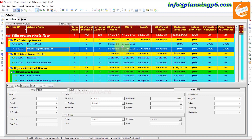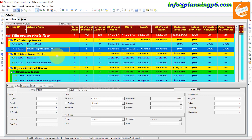Now we will add a revised schedule. You can use two techniques here. The first is the crashing technique — if any activities are 50% or 70% completed and you want to segregate the activities, this is the period duration already completed. For the extension of time portion, you can add another set of activities under those activities. Suppose an activity is 50% complete — you can create initial preparatory work as a first activity and a second with a different name, dividing the durations accordingly.